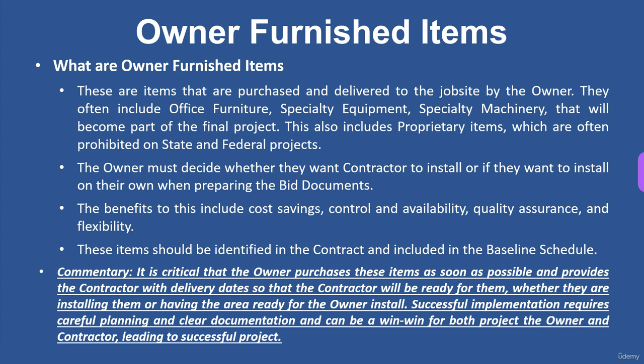I had a project where the owner was furnishing furniture. This is a federal project, and it became apparent really quick into the project the owner didn't even know they were supposed to. So it became a very hot item because the owner not only had to buy the furniture, but they didn't have the funding in place. So long story short, it took them almost a year to get the furniture. It was a phased project where they were supposed to have furniture for phase 2. We didn't get furniture until we were in phase 4. So we had to displace a lot of people because the owner dragged their feet on the furniture. So it happens.